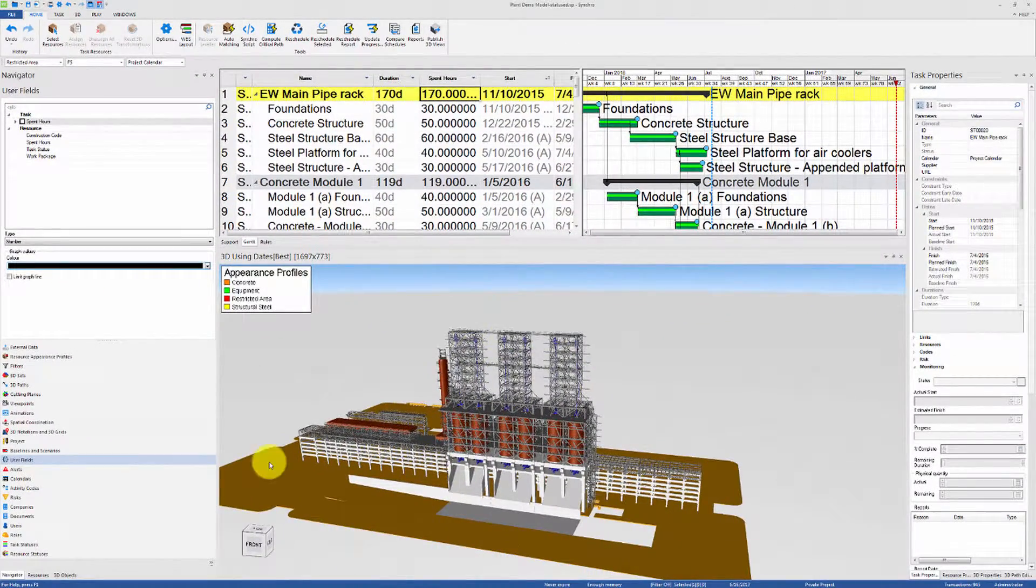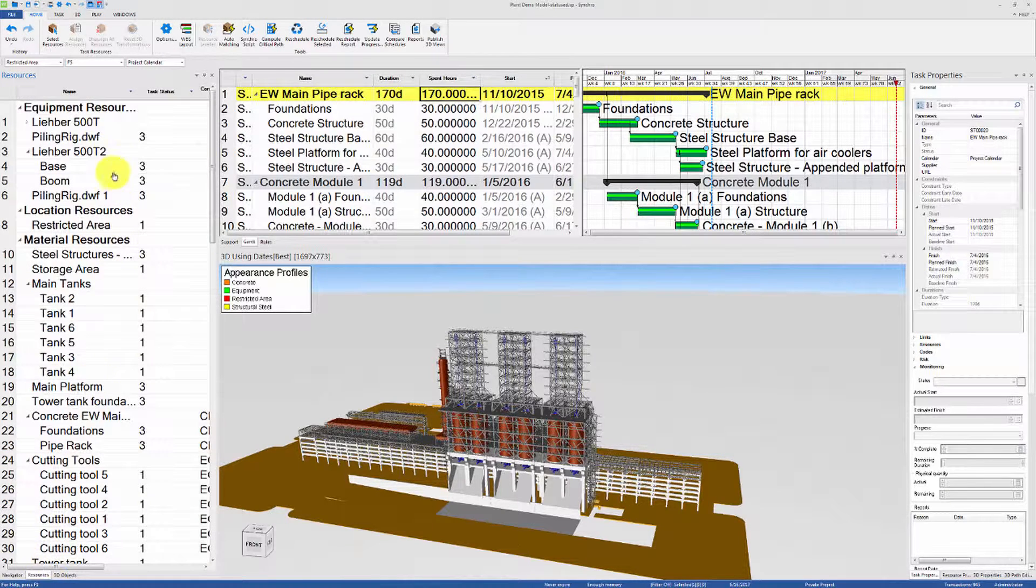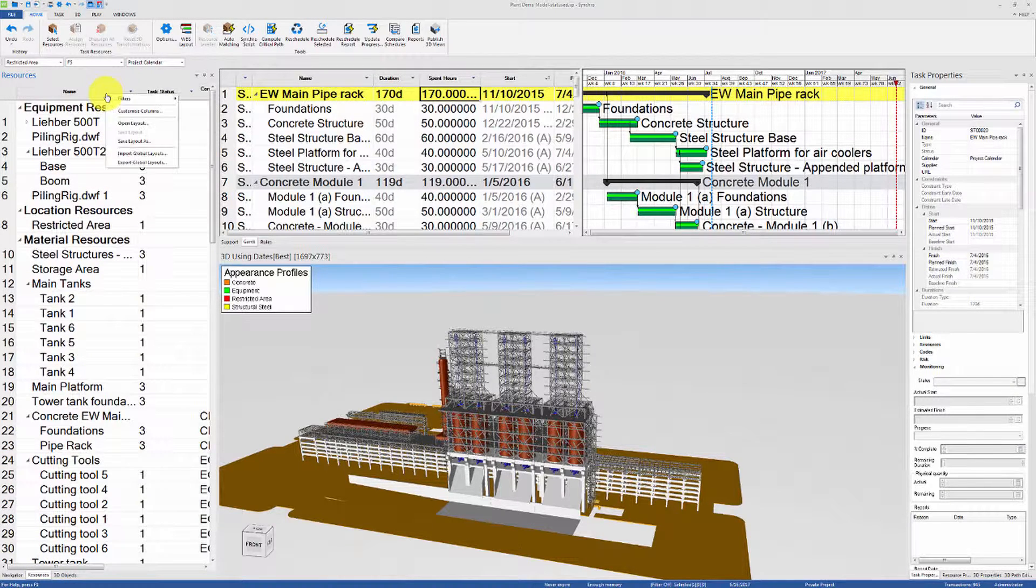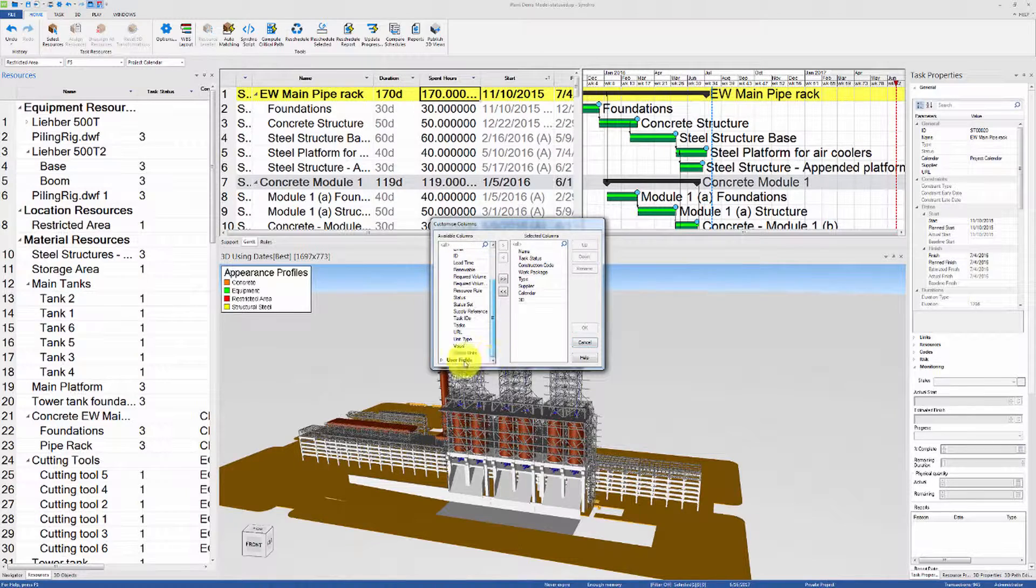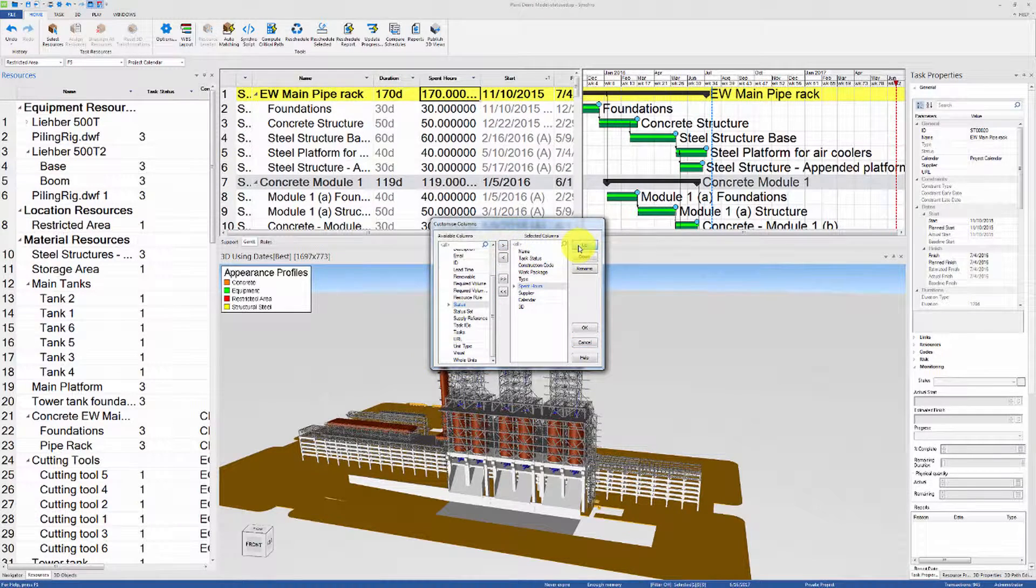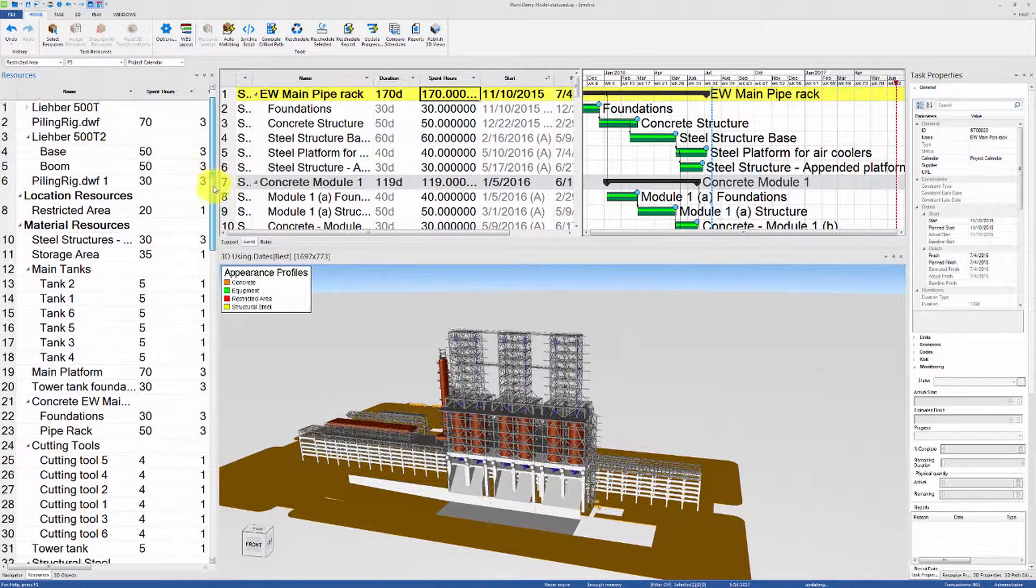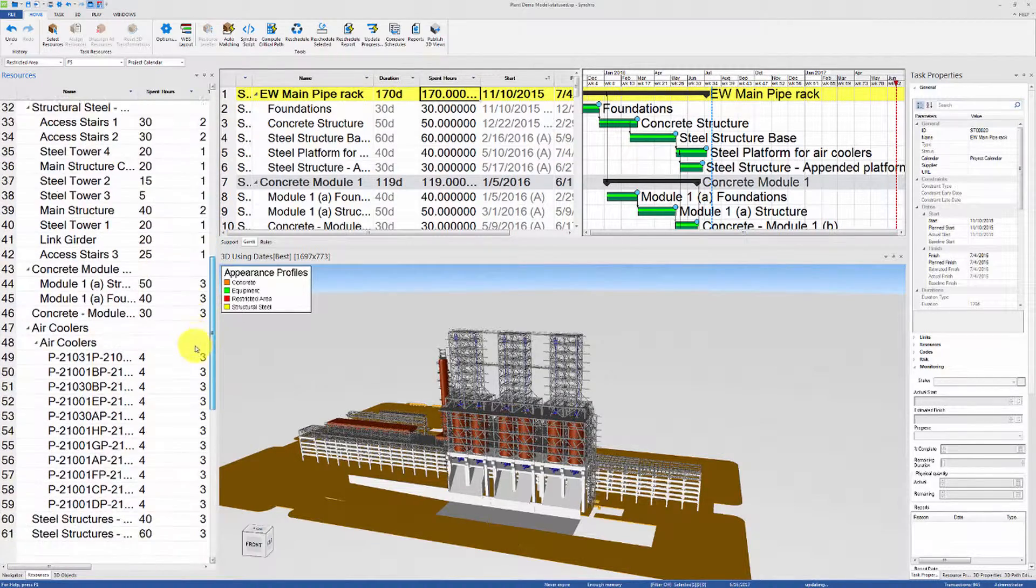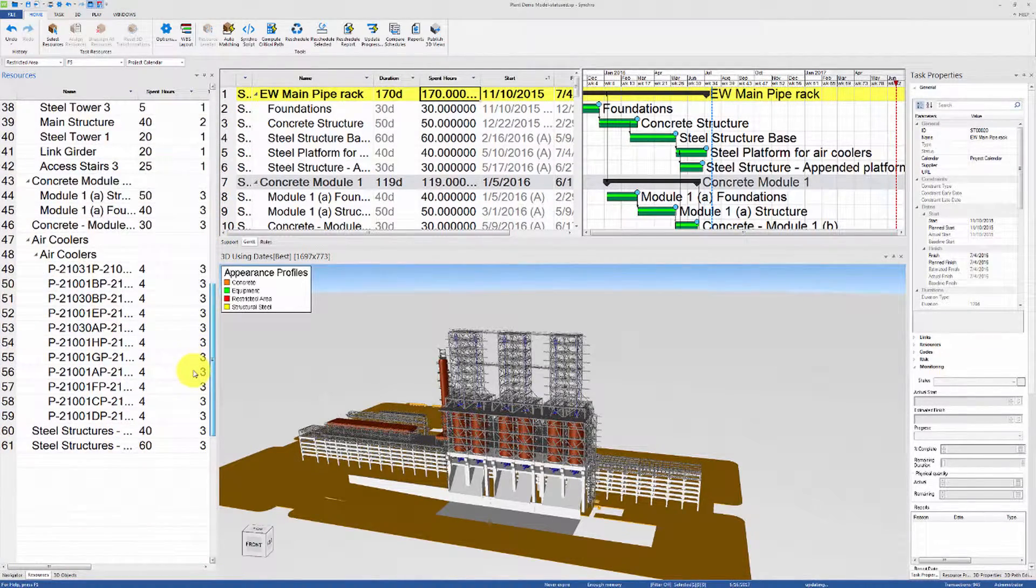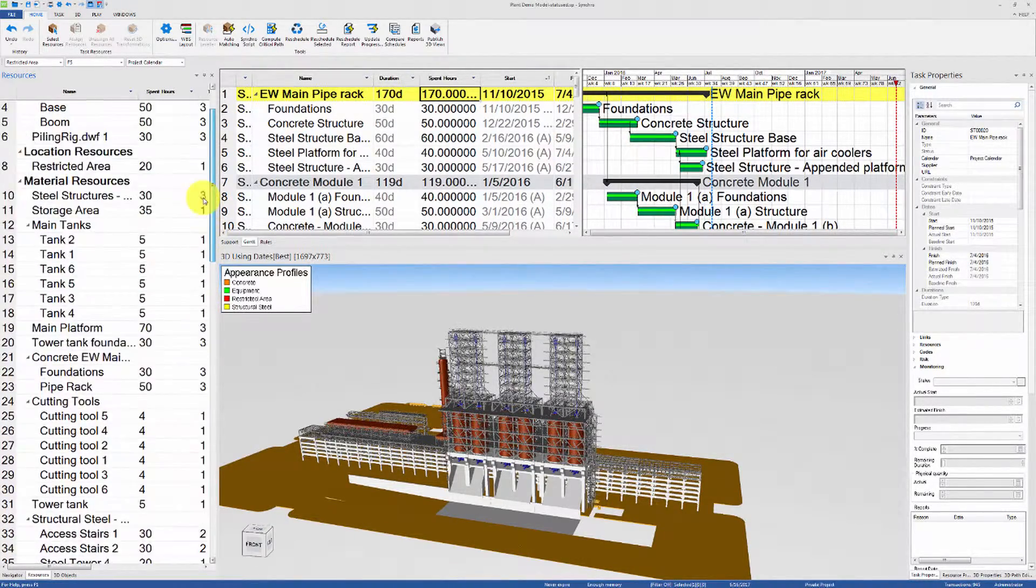Click on copy and then ok, and now let's go to the resources tab and show the column for the spent hours. Now that we have this information stored in each resource, we can use it to improve future cost and schedule estimates.